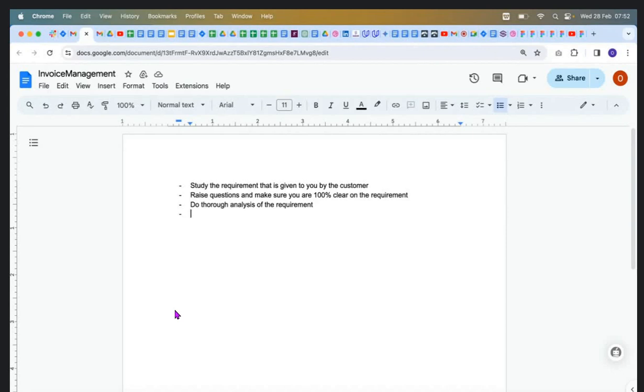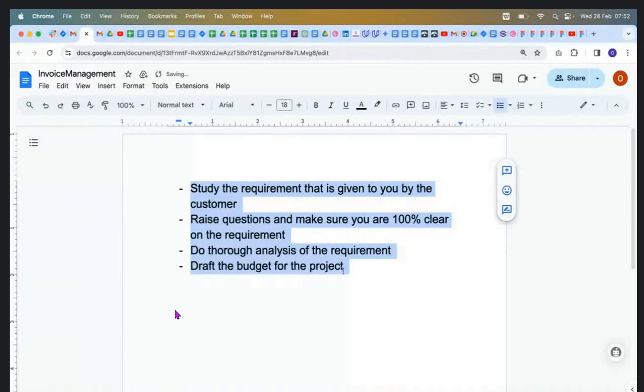That includes your laptop, your offer letters, the maintenance of HR people, your day to day office rent, your electricity, the many office accessories you use, those costs. There is an admin department. So including all expenses, you have to take the salary of the people and consider the profit of the company, including everything.